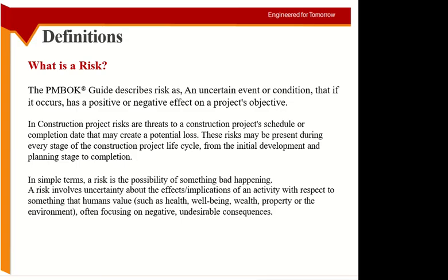The money, we have some additional amount which is allocated for risks, 10%, 15%. Okay, so in most of the cases the risk can be within the amount you have allocated. But the problem happens mainly with the delay. We did a study many years ago, it was published as well, where we focused on the delay items. So the most important or the most recurring risks for the construction projects are related to the time.